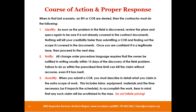Number three: quantify. When you submit a COR, you must describe in detail the extra work and cost — including labor, equipment, materials, and the time impact to the schedule. Any such claim will be scrutinized in infinite detail. Do not inflate the pricing, because it will become readily apparent. Under prevailing wage laws, labor costs are absolutely known to everybody, and the hours you're claiming will be worked over to the max. Don't inflate pricing, but don't be afraid to ask for everything you have coming.